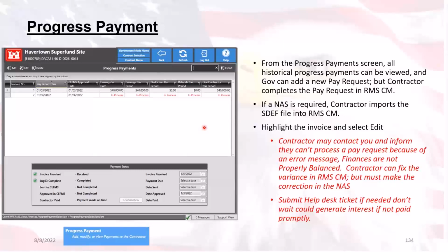This is usually caused because the contractor didn't rebalance the activities after a modification was enacted, or they balanced the activities in anticipation of a modification being enacted on the contract. Progress payments should be a reflection of what is currently listed in the contract.